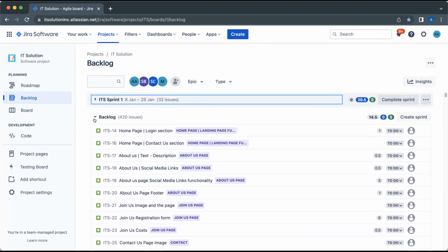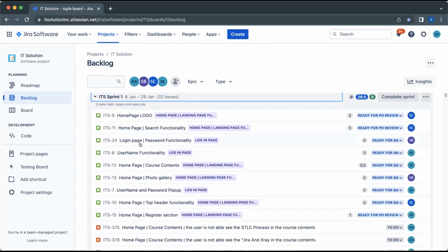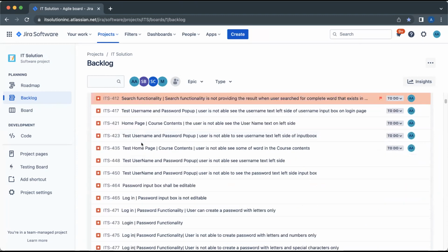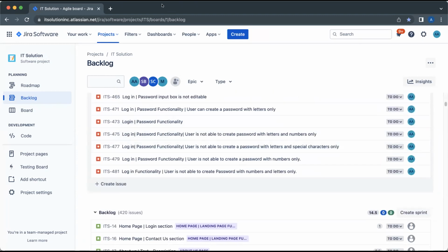See, this is good, right? Yeah, so that's what I was asking. Are we adding these to sprint 1, or are we creating sprint 2 and adding these to sprint 2? Add everything to sprint 1, and this is not the normal flow, guys. The reason we cannot close sprint 1 is because we have not gone over those defects or the outstanding work items, and we need to do that in order to complete sprint 1.